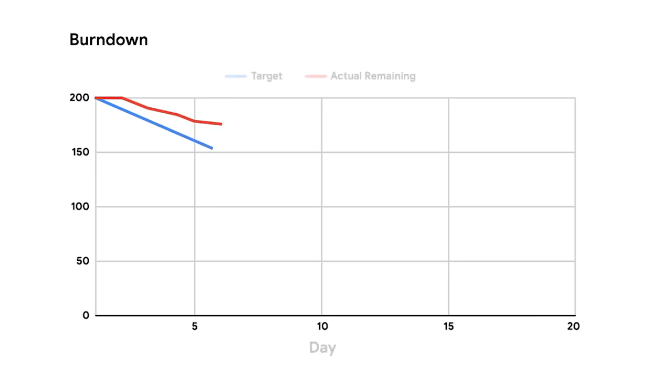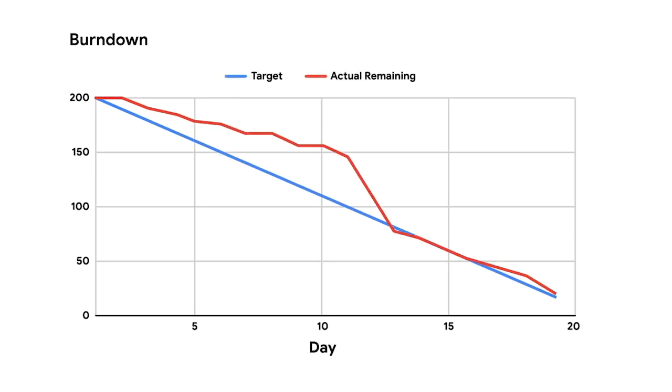Here's an example. Let's imagine our Virtual Verde team's sprints are 4 weeks long, which will count as 20 business days. In their July sprint, the sprint backlog had stories that added up to a total of 200 points to be completed. If you assumed an even burn of points over the business days, you'd expect 10 points to be burned each day. By day 5 in their sprint, 22 points had been burned or completed. Okay, it's only 25% of their sprint, so maybe things are on track.